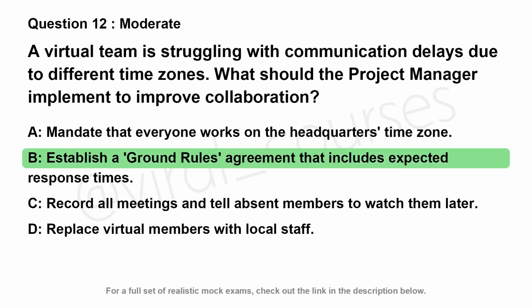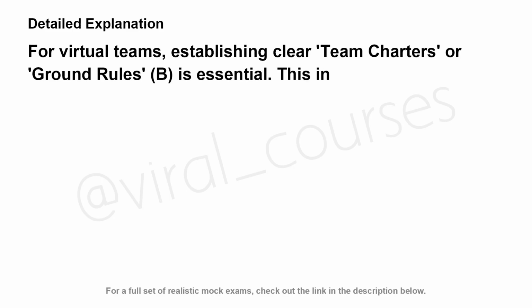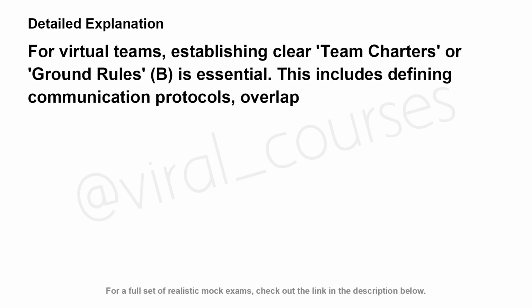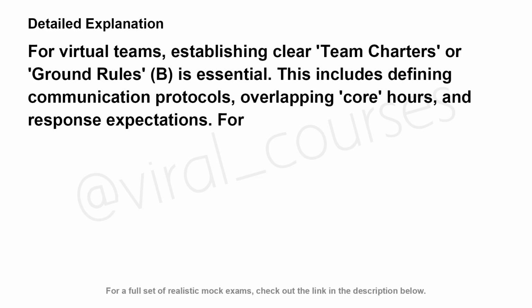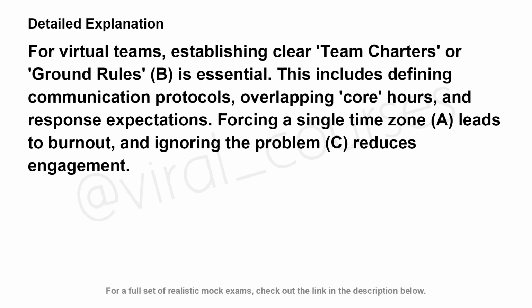The correct answer is B. For virtual teams, establishing clear team charters or ground rules, B, is essential. This includes defining communication protocols, overlapping core hours, and response expectations. Forcing a single time zone, A, leads to burnout, and ignoring the problem, C, reduces engagement.